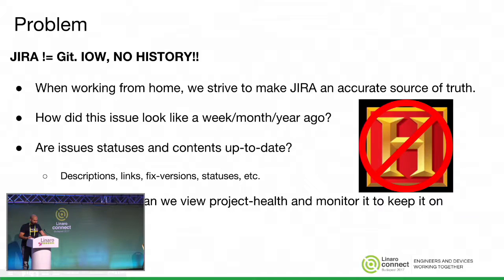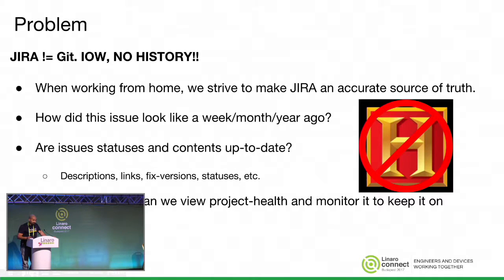The problem is that if we wanted to collect some metrics from Jira so it can be used by managers, directors, and team leads to view the health of the project — especially when working from home — we need at least one source of truth that is accurate, which is Jira. But Jira doesn't let you look at the status of an issue from a week, month, or year ago out of the box. So we had to find a way to script or plug in a custom-developed solution to get that done.